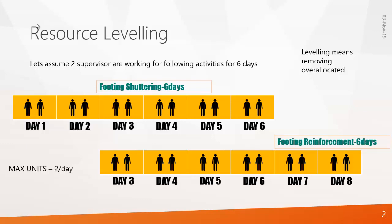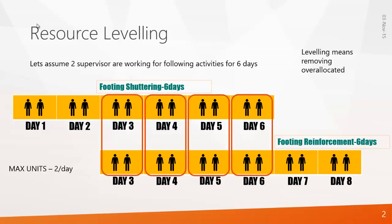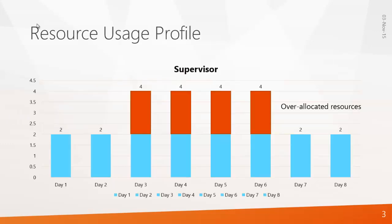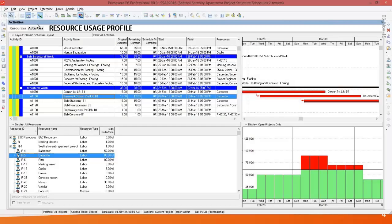In such cases, on day 3, there will be an over-allocation in the project — meaning you require 2 more supervisors to complete the task. When you go into the software, the program will display a graph showing a red color bar indicating over-allocation on day 3, 4, 5, and 6. In the software, when you go to the resource usage profile option, you can see the same graph. All these things have been explained in my previous video, so please watch that.